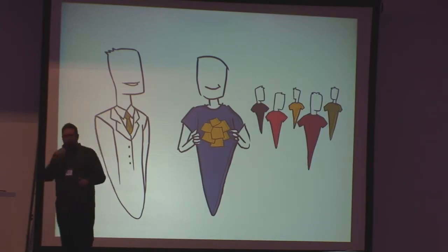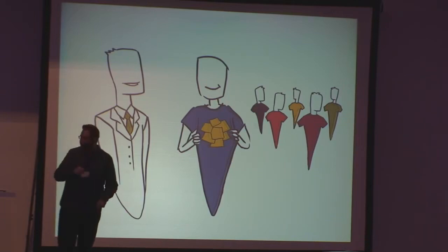They are the single interface to the team for all external stakeholders, whether that be management or customers. This is the single point. If you want access to that team, you're supposed to go through the product owner.